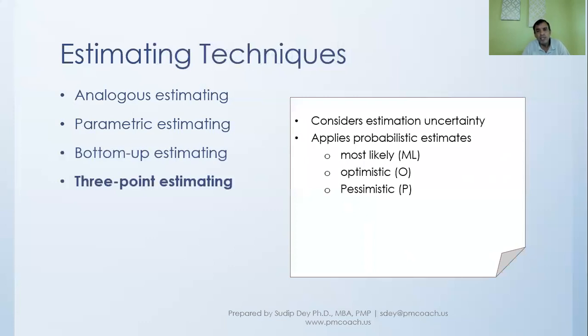So yeah, that person might say, hey, it'll take 5 days. So then you say, okay, what is the best estimate? Let's say when you're doing this, you don't face any problem, everything goes smoothly, how much time will it take? Then that person will say, hey, probably it'll take 4 days. And what happens if you face some kind of problem? Because all the time we'll face some issues or other. So what is a pessimistic estimate? That person might say it'll take 7 days.